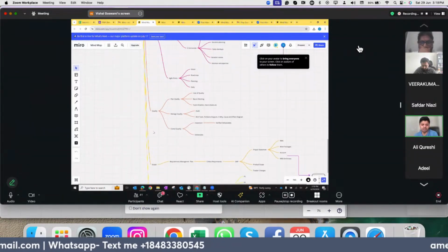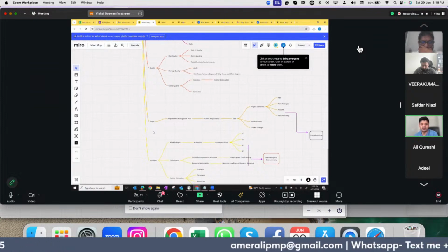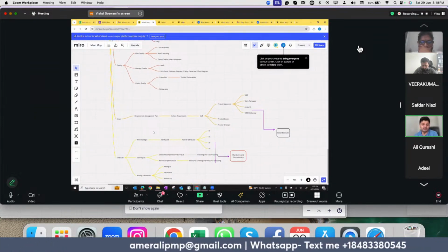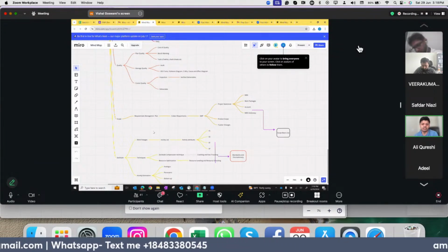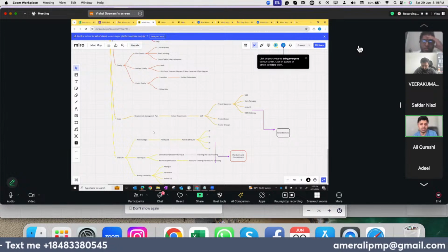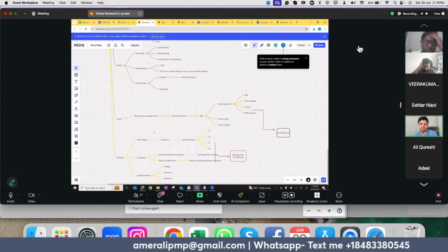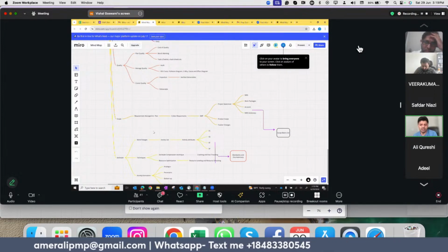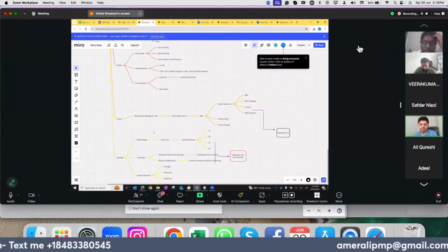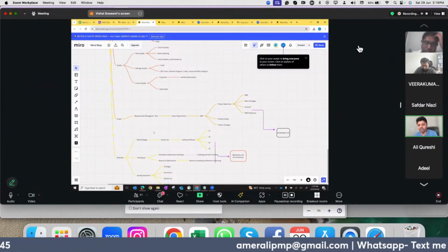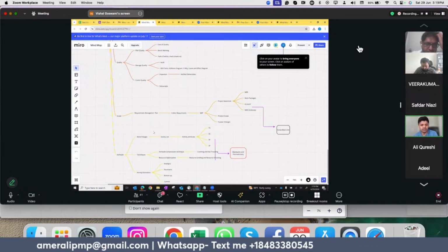to give us verified deliverables. The next part is scope, where we have the requirements management plan, where we collect the requirements, and then based on that, we filter out the requirements and create the scope management plan, from which comes the project scope statement, product scope, as well as tracking changes. Within the project scope statement, you have the work breakdown structure, which is divided into work packages, control accounts, and the WBS dictionary. All of that goes into the scope baseline, which gets approved by the leadership or the owner, basically, or the sponsor.